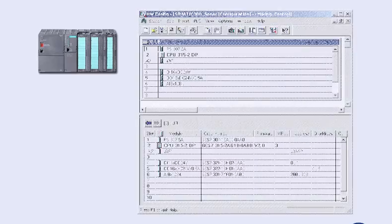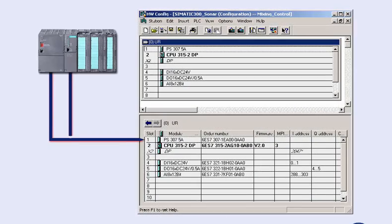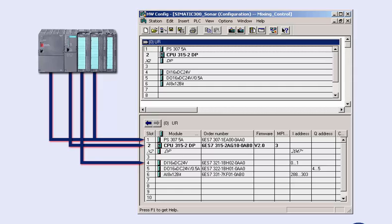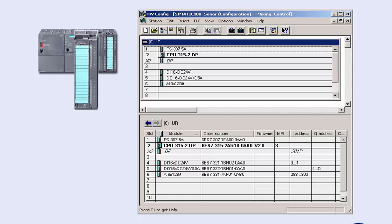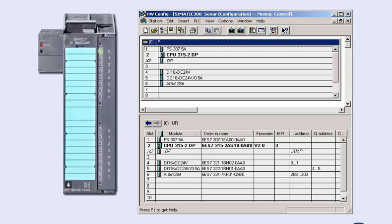The now customized configuration data provides us with the correct module rack setup in the editor. For commissioning the user program later on, it is absolutely necessary that the signal path, for example from the encoder to the CPU, corresponds to the wiring plans. Wiring and signal testing for the process I/O is performed now, unless already done during installation. The hardware configuration editor provides you with the easily operable signal test function, which you can also use without a user program.